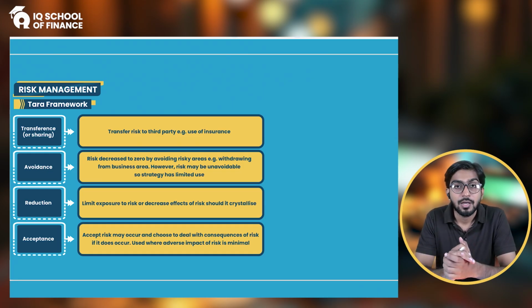may God forbid if someone gets physically disabled for the lifetime, right? Who is going to give them the monthly allowances? It's a huge cost, right? Or maybe it's because of your company's negligence that the person is now disabled. So they are going to sue you, and maybe they could ask for millions of dollars in penalty. How are you going to pay this? It's a risk, right? So what a company does is purchase an insurance cover.